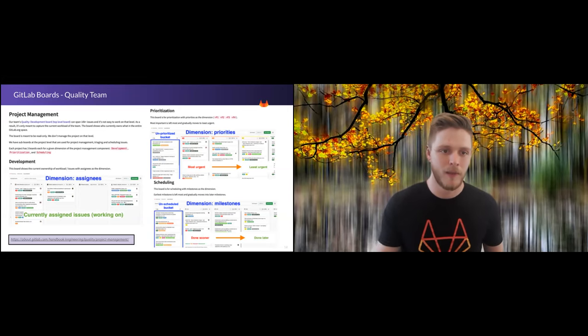And when you drag issues from labeled lists, the labels get taken off and added as you enter and exit the columns. And that way it lets you do your workflow boards, so you can go ready for dev, developing, ready for test, ready for deployment. However you have your workflow, you can create your labels in your own way.